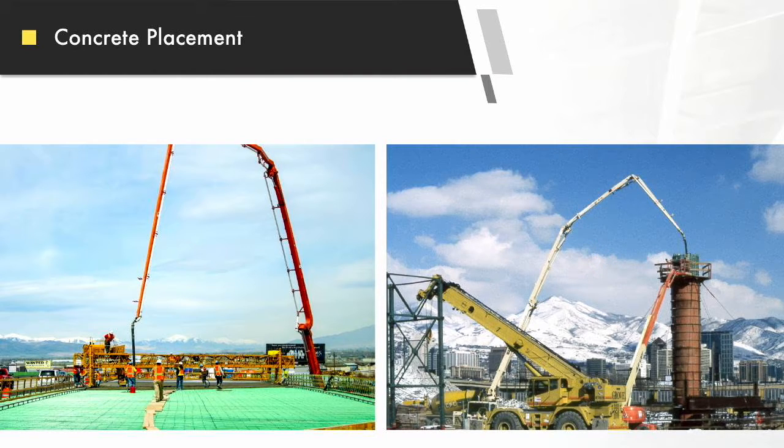But what you do need to do is some testing from the same angle off to the side, from the truck to the end of the pump, to see what air loss you're getting through the pump.